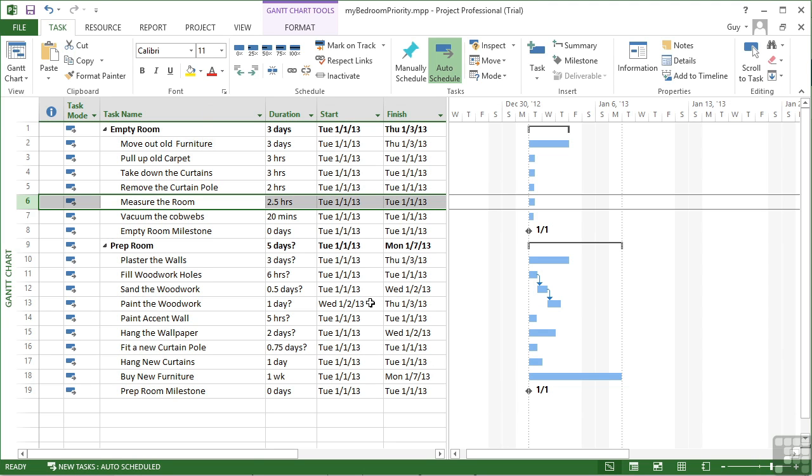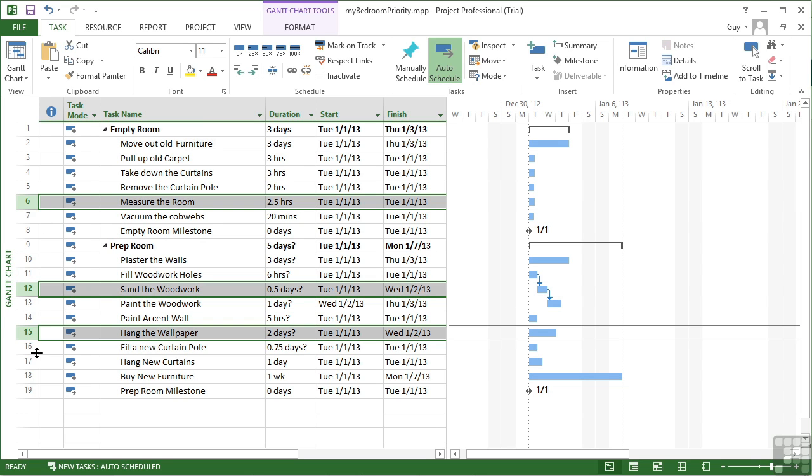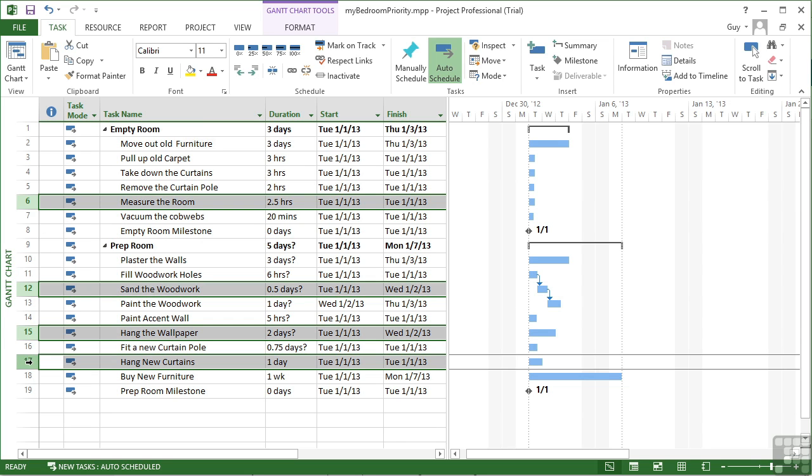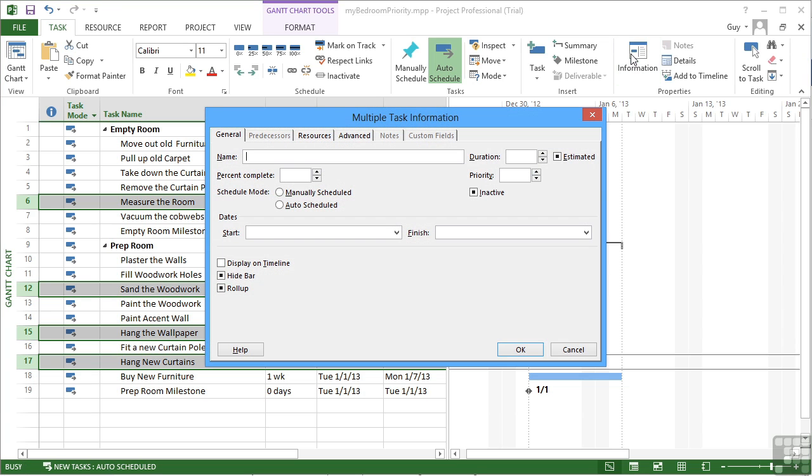Now you can change tasks on mass. So we could control-click that one, that one, that one, and that one, go into the task information and make them all 600, so they're all slightly more important than the default.